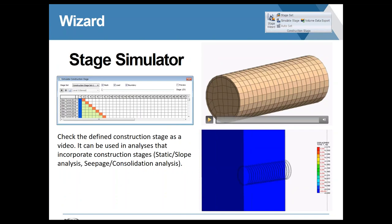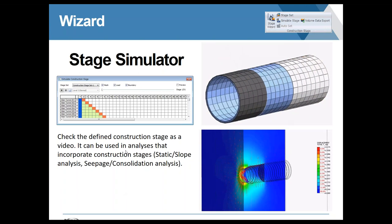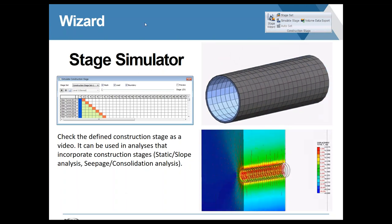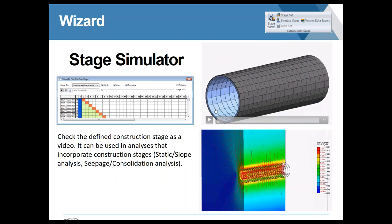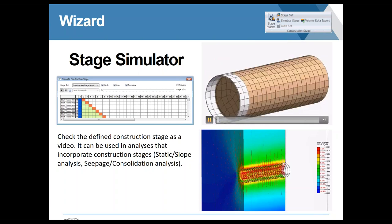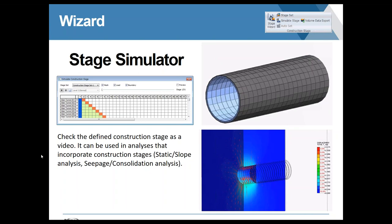Once finished, you can inspect the construction stages visually. Here we're looking at the construction sequence of today's session: first the rock, then the shield, then the joint segments or rings represented in blue, and then the grouting in black. The shield excavates, installs the support segments, and then grouting is injected—this is the sequence of the TBM excavation we're modeling today.